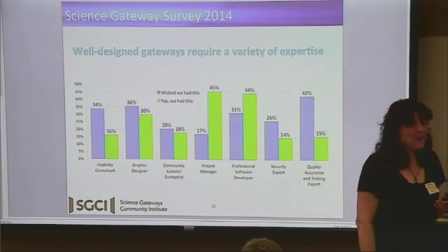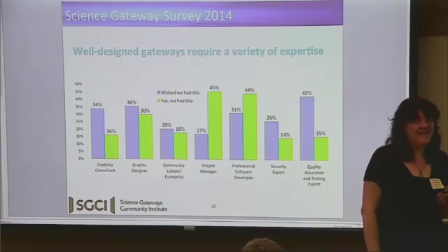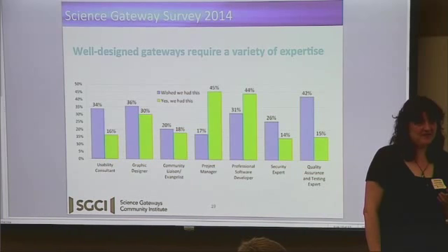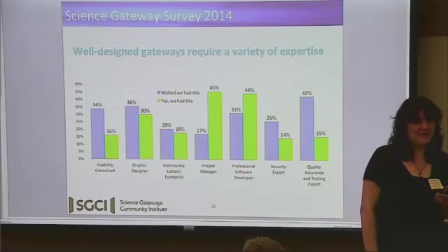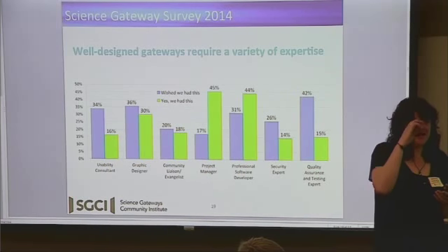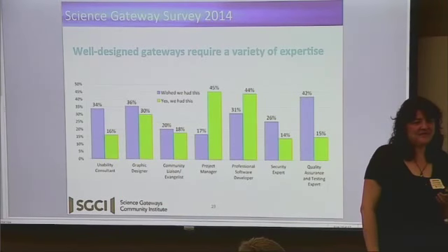Okay, if we're deploying a science gateway, we identify the requirements with the researcher, put together a team that can satisfy those requirements, develop a plan, develop a schedule, determine how much it's going to cost, depending on how much time it will take. We start working with the researcher through the milestones.